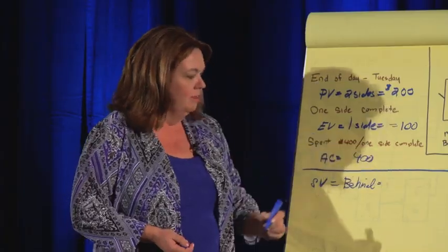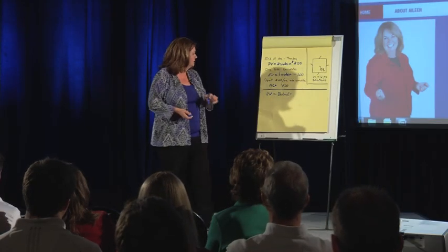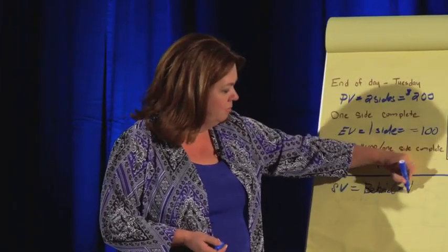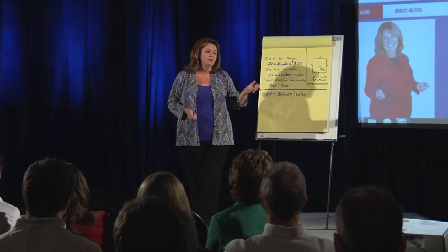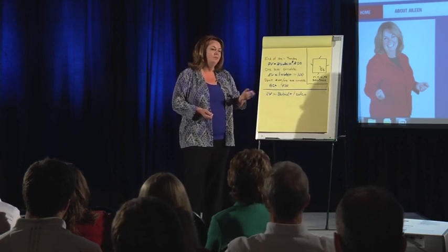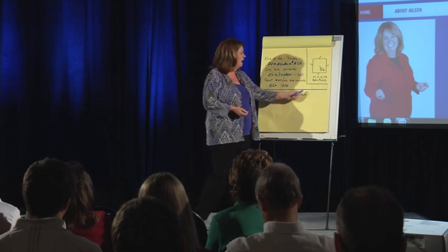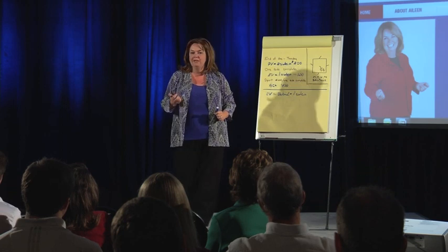Okay. By how many sides? Okay, so we're behind schedule. We're behind schedule by 1 side. Again, the word side would not be on the exam. It would be in terms of dollars. If you had to convert 1 side to dollars based on the original budget, what would it be?